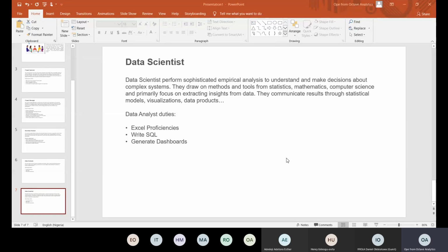So for a very large project, it's advisable, though in the best case scenario, it's better that every member of the team is there. But it is advisable that you invite only the unit team leads to represent at the Scrum meeting. So the unit team leads would talk on behalf of their unit and just quickly itemize what was achieved within the unit yesterday, what they will be doing today, and what their challenges are.